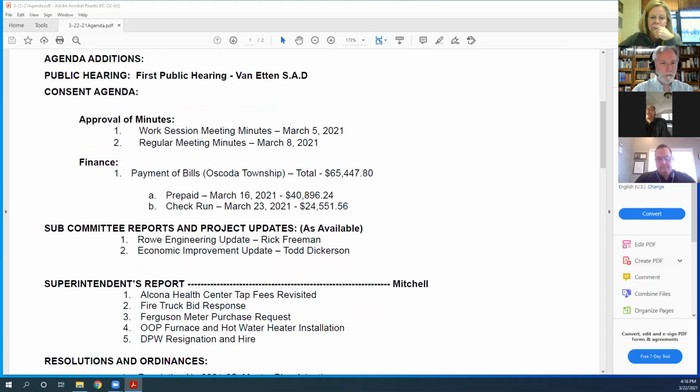Phases B, G, and the F41 portion of Phase H, we have those projects advertised right now. Bid opening is scheduled for April 8th at 3 p.m. at the township offices. Project funding will close in June, and construction will be authorized immediately upon closing. Depending on the contractor's schedule and ordering materials, that goes hand in hand with Phase A and Woodland. Probably late June, early July startup.